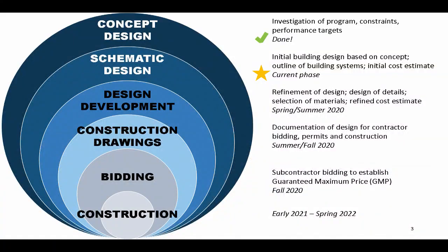And so there's this tail that follows after each one of these phases, after the core part of the phase, and then there's this tail that runs out where you have review and you have discussion and you have refinement, and then you get that cost estimate. And so during that time, the next phase begins, carefully, making sure that there's still time to start incorporating that feedback. But you see one phasing out and the other one beginning, and so you have that very iterative and very blended process as you move through that.